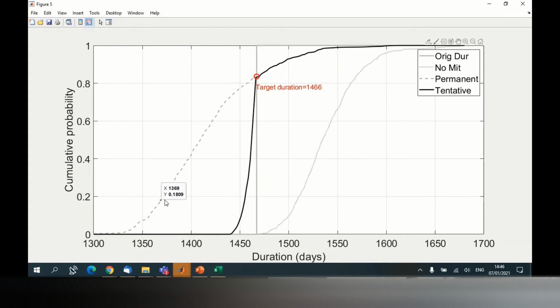But that's too bad because if you apply everything, if you execute everything, then of course you are going to pay for everything, and that's a lot of money. Maybe there are some mitigation measures that you don't really need. So why do you implement them and pay for them? That's why we have the mitigation controller to apply only the necessary mitigation measures. Is that clear? Clear. Sorry. Yeah. Okay.